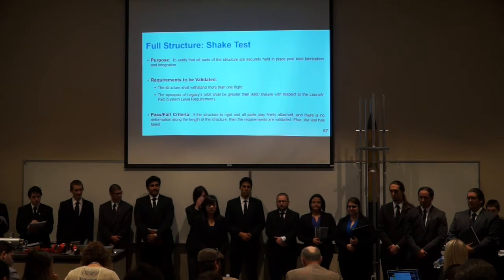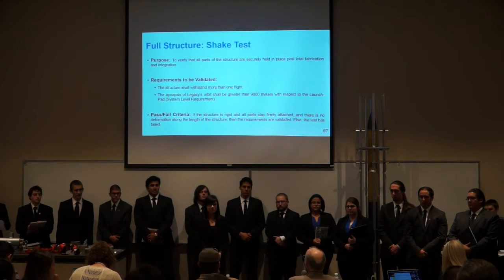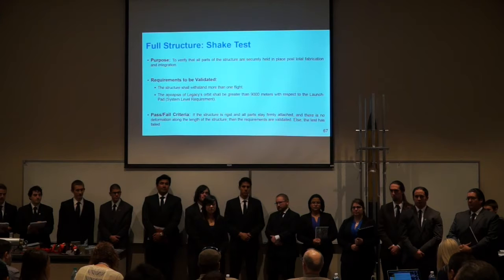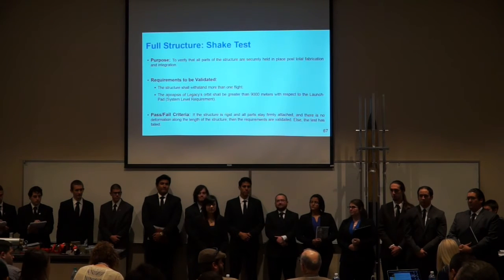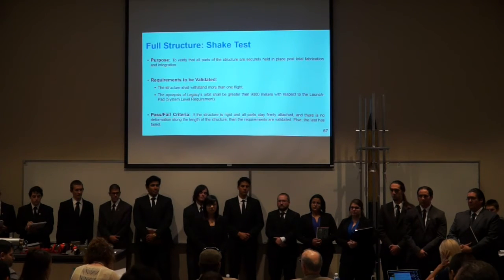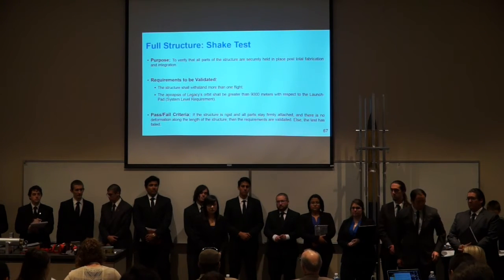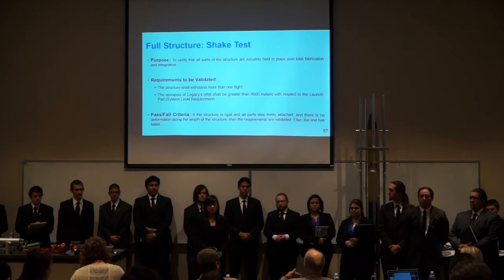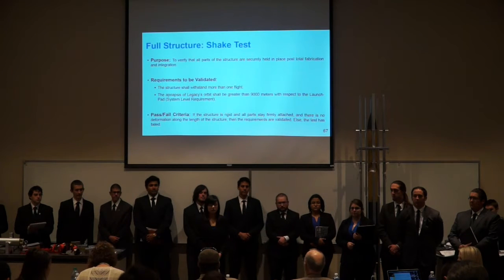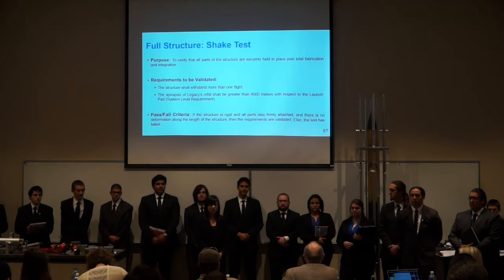I have a few comments and questions. With respect to the range, that's something that you probably should put in as a lessons learned, to negotiate right up front before you start your design. Because obviously, the range is telling you that your design is not flyable there. And so you're going to essentially have to either redesign your trajectory or find another range. So I think that's a great lesson learned for you to say, hey, we need to make sure we understand what our requirements are going to be from all of the ranges and all of the exterior environments that we're going to be in, and make sure that those are in before you start your actual design.